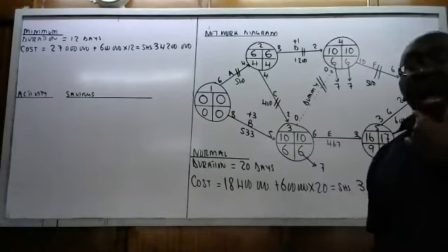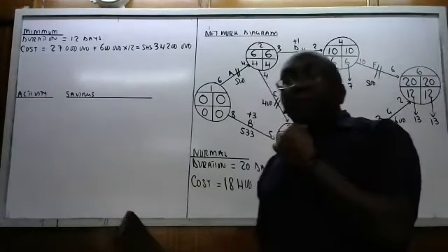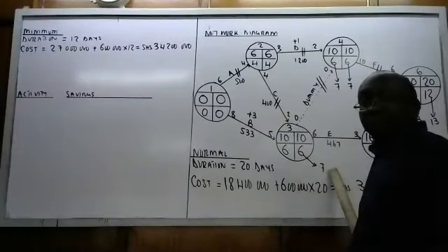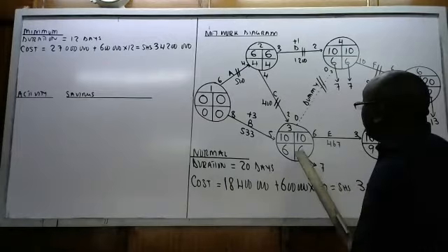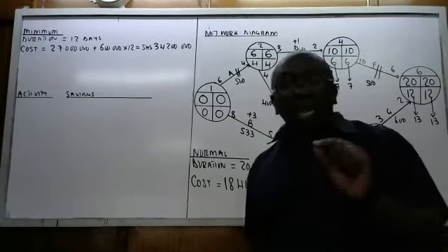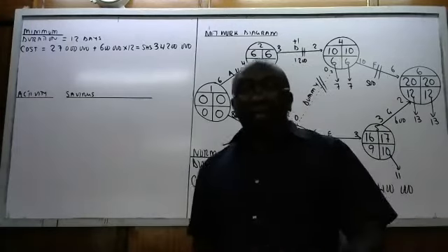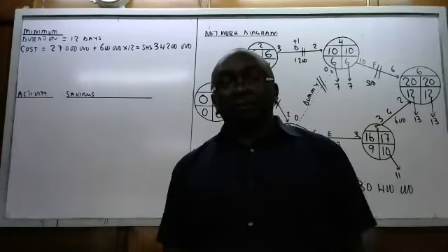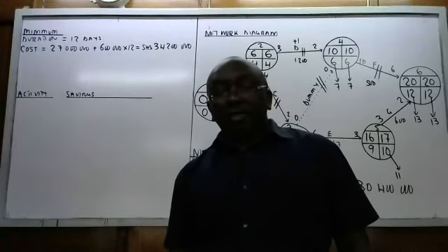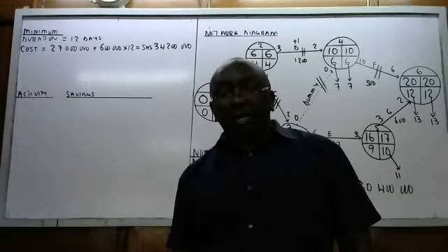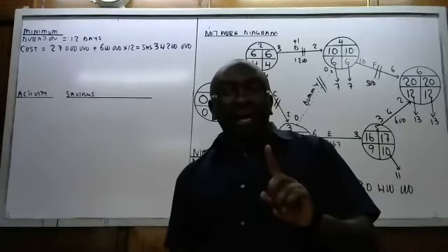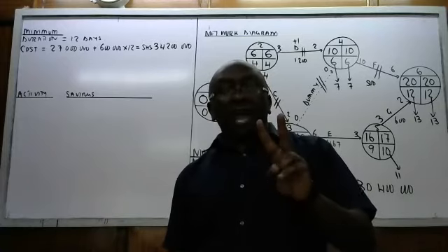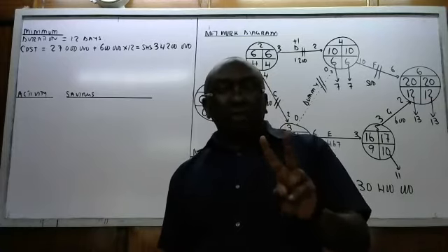If it will be 8, the latest that we should be there is day 7. So if we finish by 8, are we going to be late? Yes, by 1 day, because we added 3 days. That means we should have added 2 days so that we are not late.